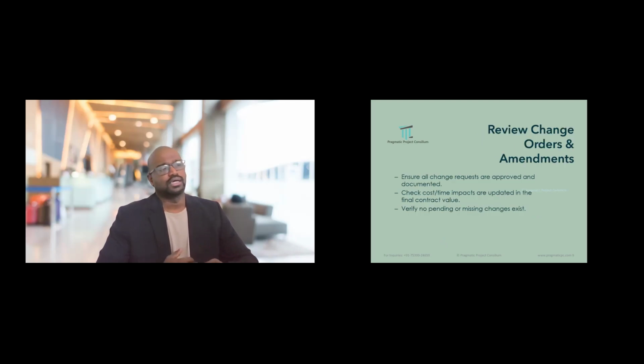Review change orders and amendments. Ensure all change requests are approved, documented, and the same has been updated in the contract. Check cost and time impacts are updated in the final contract value. So verify no pending or missing changes exist, because only then you will get a wholesome picture of what is the value of the contract and what is the time taken for the execution.